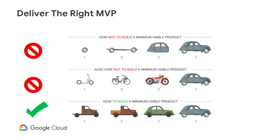The first example should be avoided, which is building incrementally. After each release there's no business value, since we only get from point A to B until the very end in release four. The second example is better — it achieves the goal of getting from A to B in each release with a working device, but it forces the team to rework the product in every release, leading to a lot of waste and throwaway effort.